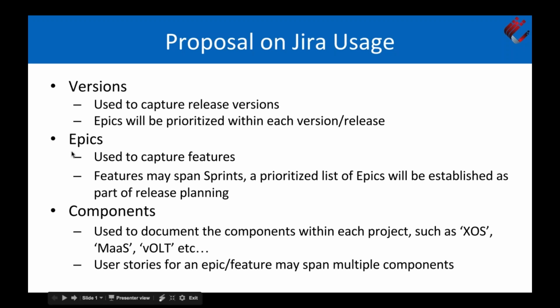The second part is that today the epics we're using tend to be very component focused, so take the epics and use them to capture features instead. Features may span sprints. We have a prioritized list of epics that will be established as part of the release planning, and this will drive prioritization of what we deliver for each of the releases.